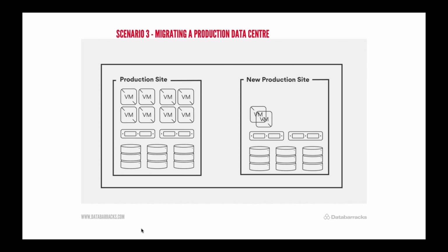You significantly reduce the chance of major downtime, compared to if you're aiming for a big bang migration. And it lowers the stakes. If there's a single service that you bring across which doesn't work, you can revert back, make sure that it's working properly, and then bring it across. With that being said, you will have a number of almost smaller big bang migrations as part of that phased migration.